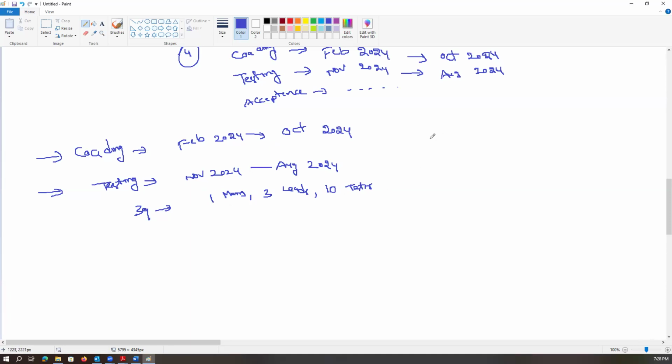How many do we have? 39. But here only 14 are there. The remaining 25, we will take further. So in February 2024, they take one manager, 3 leads, and 10 test engineers, and they will start some part of the testing work, like creating the test plan.